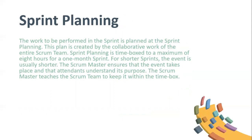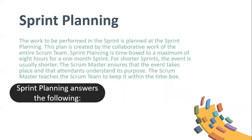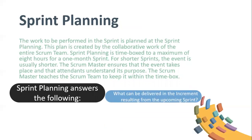Sprint planning: the work to be performed in the sprint is planned at the sprint planning. This plan is created by the collaborative work of the entire Scrum team. Sprint planning is time-boxed to a maximum of eight hours for a one-month sprint; for shorter sprints the event is usually shorter. The Scrum Master ensures that the event takes place and that attendants understand its purpose. The Scrum Master teaches the Scrum team to keep it within the time box. Sprint planning answers the following questions.